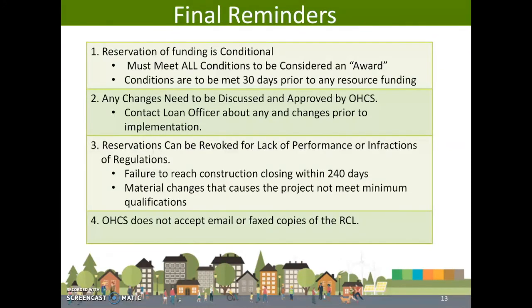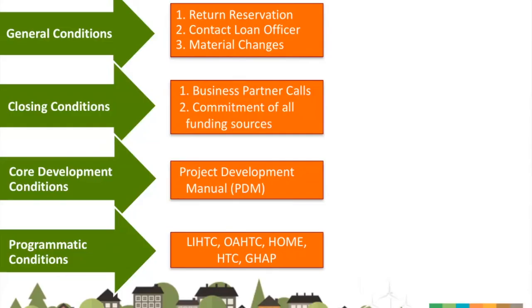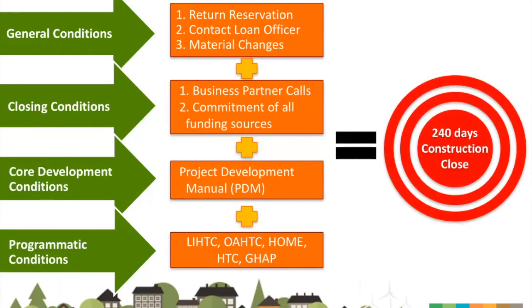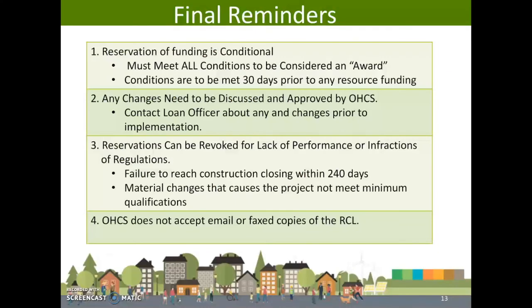Here are a few last key reminders. One: the reservation of funds is conditional, and all conditions must be met to be considered for an award of funds. All conditions listed in the reservation conditions letter must be met 30 days prior to any release of resource funding. Two: any changes need to be discussed and approved by OHCS. When in doubt, always contact your OHCS loan officer. Three: reservations can be revoked for lack of performance or infractions of regulations. Construction close must be met within 240 days. Again, OHCS does not accept emailed or faxed copies of the reservation conditions letter. We require original signatures only.